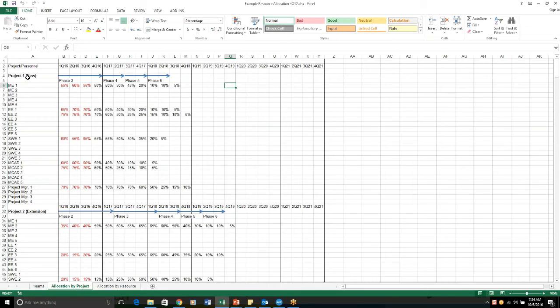So down the left side here is project 1, 2, on down through the spreadsheet, and then lined up under each project are the resources that you're trying to plan for. Now you might choose not to put in, for instance, CAD resources, because you don't want every resource in there. If there's not a lot of switching costs, then over time you'll get a feel for the load on those kinds of resources, and you can manage those a little easier.